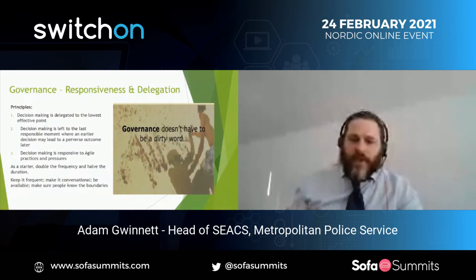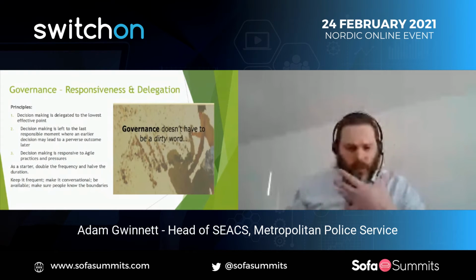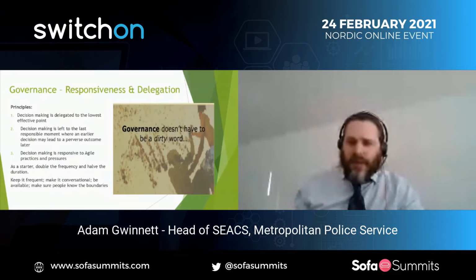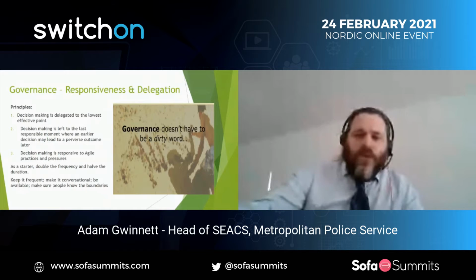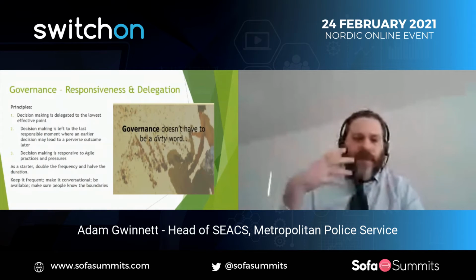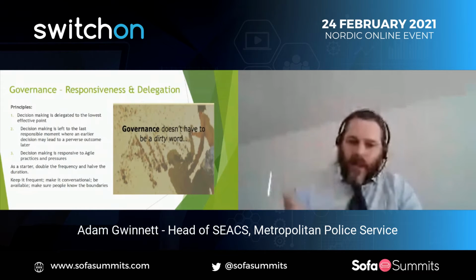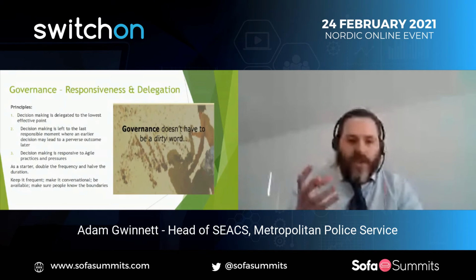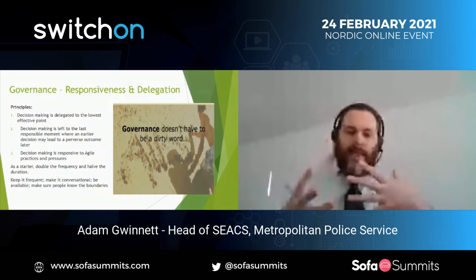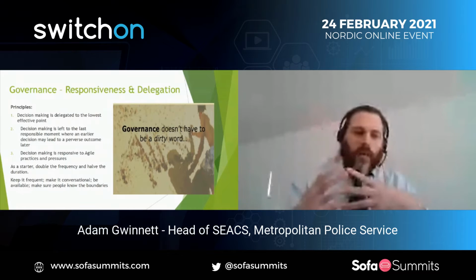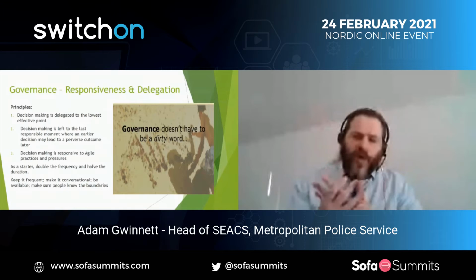So one of the things that I normally spend a lot of time doing is going back and explaining to people in the delivery community, but also senior business stakeholders and the C-suite level, why that governance existed, what purpose it delivered for the organization, effectively how it was supposed to be focused on removing duplication of effort, enhancing value, focusing actual delivery around the key priorities. So I used to do a lot of work with things like benefits dependency networks and the strategy to show how change work was delivering key enablers for the business and where the business was trying to get to.